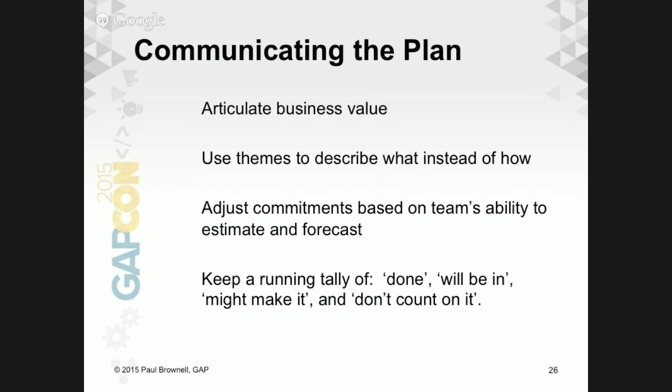So the two can work together, and to do some user experience modeling, to do wireframes or workflows that you then take to prospective users and say, here's what we're going to build, here's the business logic and how it's going to flow. It gives you not only user experience feedback, but it also gives you validation of the user stories and the priorities, and some confidence that when you finally do build it, they'll say, yeah, that's what I thought you were going to deliver, and I'm still on track with it. So the two can work together very nicely.